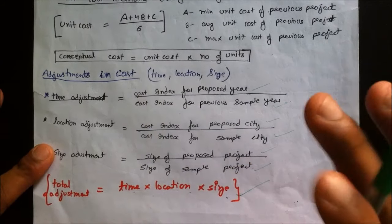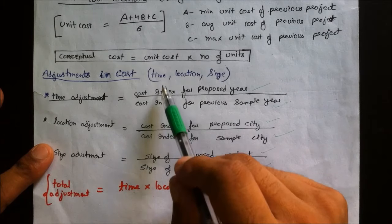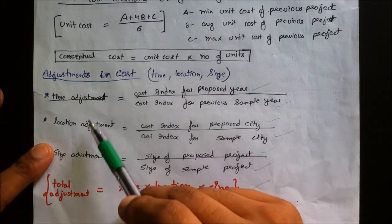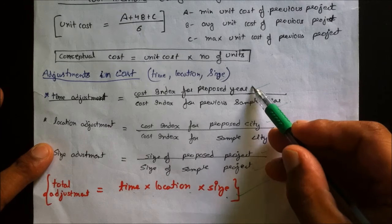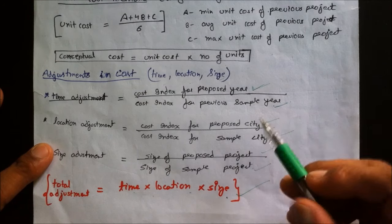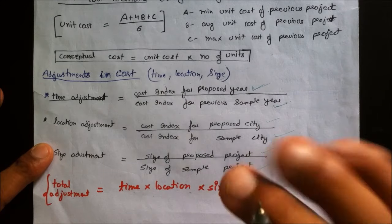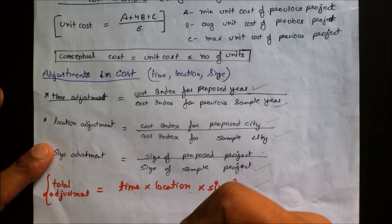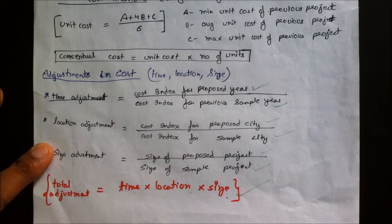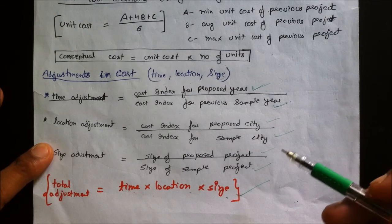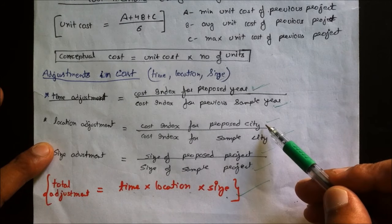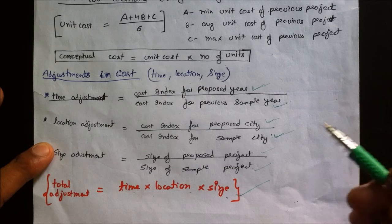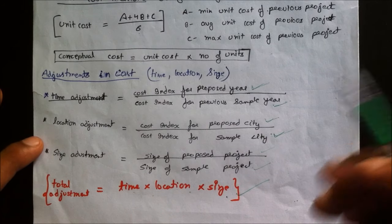There are correction factors applied to cost estimates: time factor, location factor, and size factor. For time adjustment, if a house was built 10 years ago, we use cost indices — dividing the current cost index by the old cost index gives the time adjustment factor. For location adjustment, if a house was built in Mumbai and we want to build in Delhi, we divide the cost index of the proposed city by the cost index of the sample city.